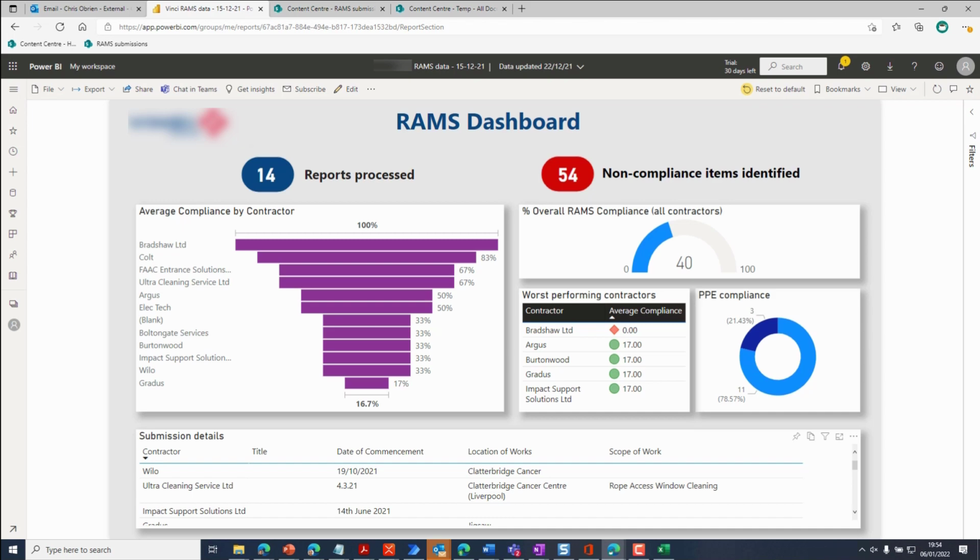So in this example, we've used Syntex really to do the first pass of the document, to use AI to understand which information is present and which is missing, automate the process by emailing the subcontractors automatically and making sure that we get a quality submission before the work proceeds. And we've got this analytics piece, the dashboard, which is really helping us monitor the process and understand how well we're doing. So two quite different usages of Syntex there compared to the first video, but really it's all about how you use the ingredients, and hopefully these two videos combined help you see the possibilities.